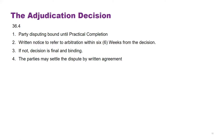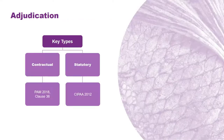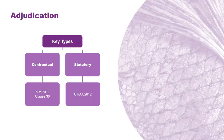One could ask why this only applies to the employer's entitlements and not to the contractor's — it is a somewhat one-sided clause. A few key features of the adjudication decision: once the adjudicator makes a decision under contractual adjudication, parties are bound until practical completion. Written notice must be given to make a reference to arbitration within six weeks. Importantly, we are talking about contractual adjudication, not SIPA. SIPA also applies — even though PAM is silent on SIPA, being a statutory provision, it overlays and also provides that temporary rough-justice quick fix, although not mentioned in the PAM contract.